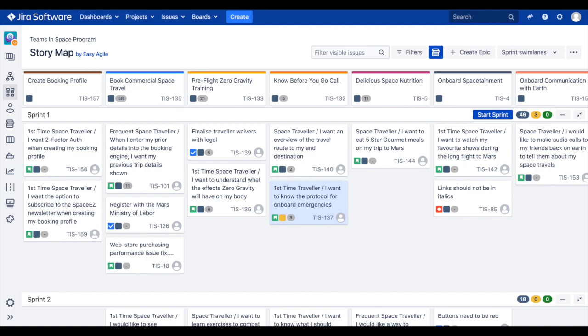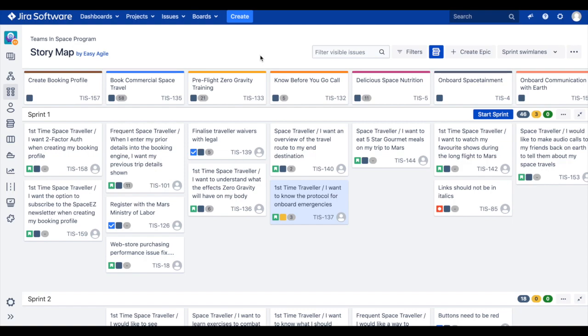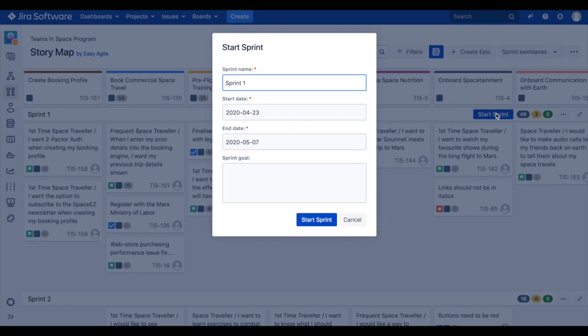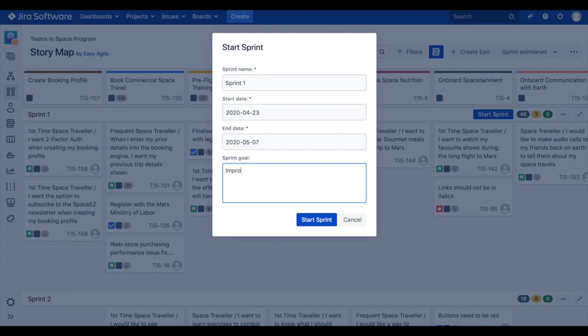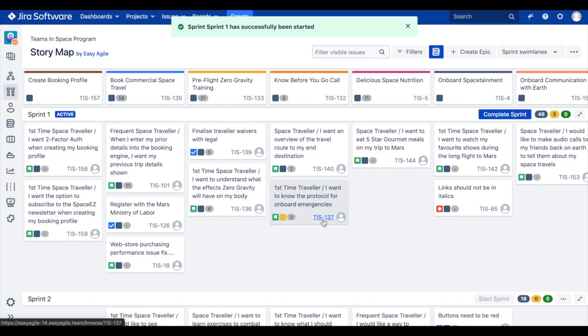To start a sprint, click on the blue Start Sprint button at the end of the top swim lane. Here, you can edit your sprint name, update the start and end date, and enter the sprint goals. Click Start Sprint. Your sprint is now active in JIRA.